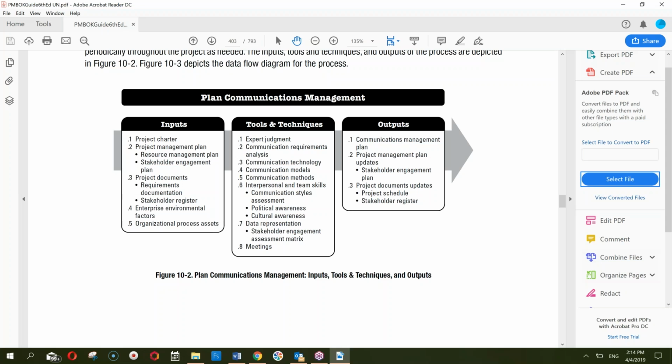and as a result of this analysis, the requirement analysis about the communication. I'm not talking about the overall requirement analysis. We are talking about the communication requirements analysis. So who needs what information and when? So basically this requirement should come from the stakeholders, you should not be designing it on your own. So ask your stakeholders what do they want and when.